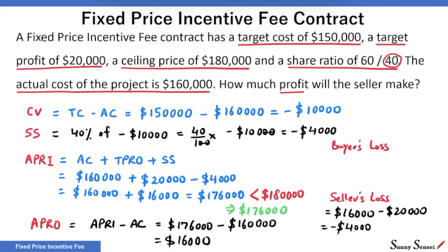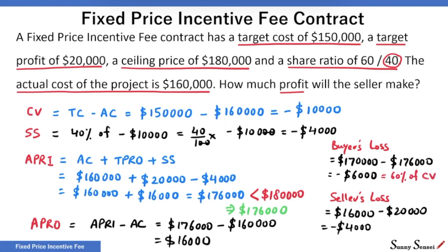The sum of target cost and target profit is the target price: $150,000 plus $20,000 is $170,000. But the buyer has to pay $176,000 — $6,000 higher, a loss to the buyer. Buyer lost $6,000 and the seller lost $4,000. Together they lost $10,000, a value equal to the cost variance. 60% of the loss is on the buyer and 40% is on the seller, which matches with the share ratio of 60 to 40.